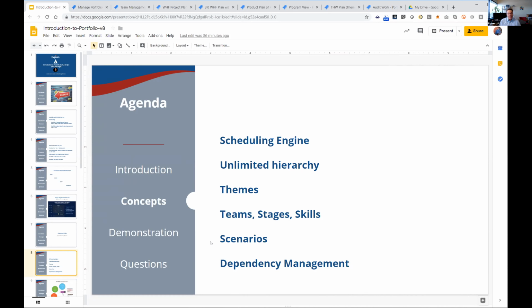Now, you can explicitly schedule everything. You just need to know that until you get it all scheduled, some weird things are going to be happening on the screen because you have a scheduling algorithm that's running in the background. Now, once you incorporate all your dates, once you get all your information, that scheduling algorithm looks at everything and says, oh, everything's manually scheduled, I don't have to worry about it. But until that point, people can get very frustrated because they kind of get it in their head that we can schedule about half the work and things should just happen.